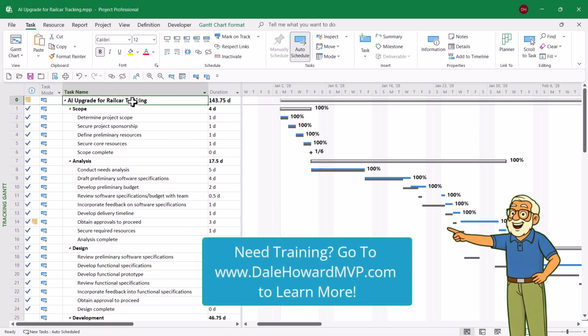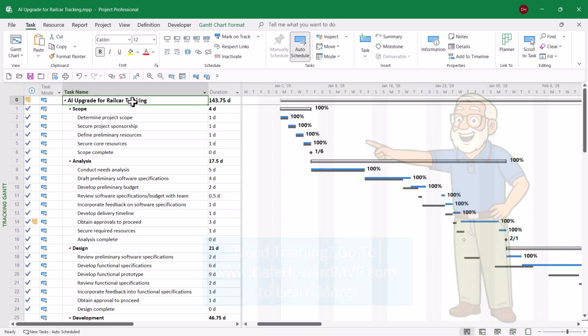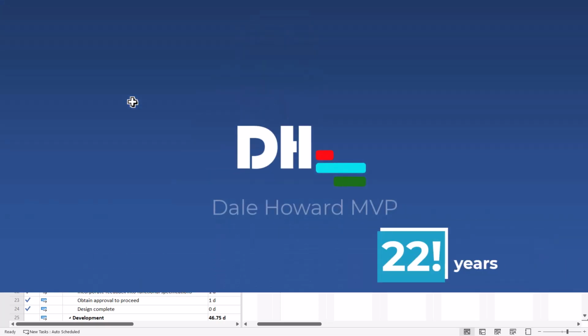If you have any custom Gantt-based views that you've created, to hide the link lines in them, you'd have to apply or display your custom Gantt-based view, and then you can use the Layout dialog to hide or display the link lines as you want.